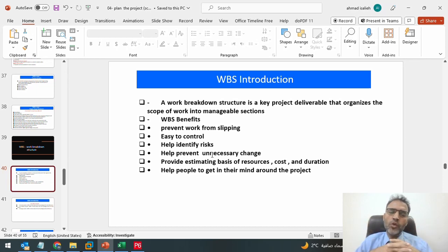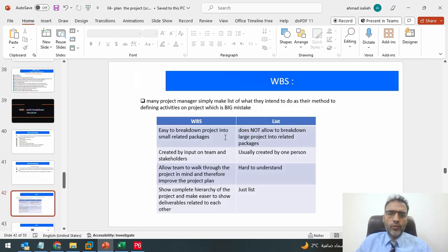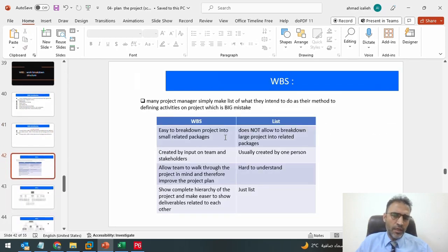And we are talking about so many WBS. Some people argue that I don't have to create my own WBS, I can just create a list. Unfortunately that's not true, because the WBS is totally different from a list. Actually, the list is hard to understand, and it is created by only one person. Talking about the WBS, it will not be created by only one person. For example, the package related to electricity will be created by the electricity team leaders. The package related to HVAC will be created by the HVAC team leaders.